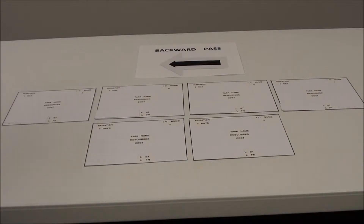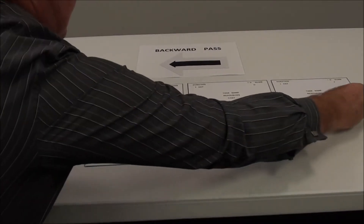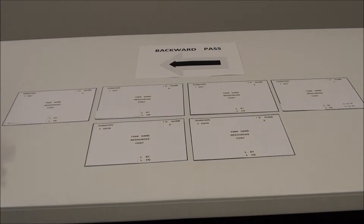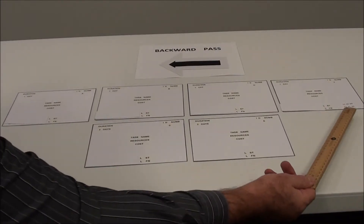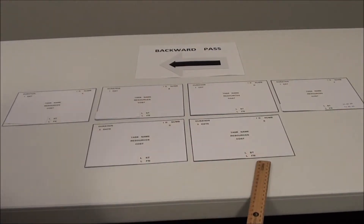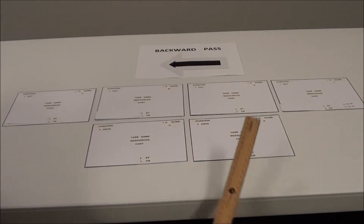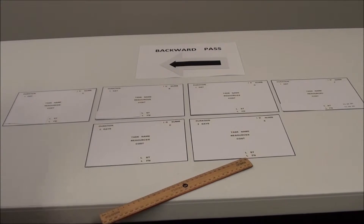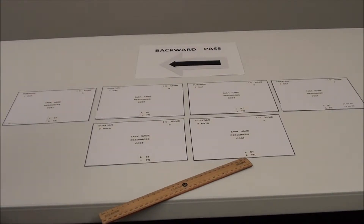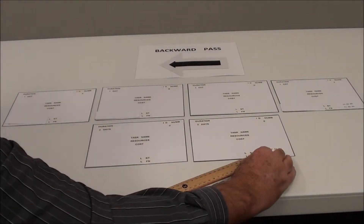So we're going to start at the far end this time — we are going to finish by Monday the 8th of August. We use the same relationships as we had going through a forward pass. If that task can't be started till Monday the 8th, this task here — the latest it could finish is Friday the 5th, and then the latest it could start is Thursday the 4th.